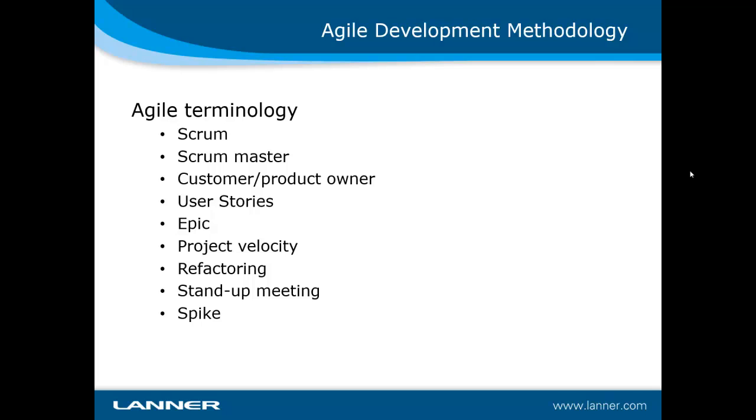Normally the requirements in Agile development are constructed in such a way that they're a sort of equal size of workload for each requirement. So each user story should be about the same size. If we get a story which is particularly big, which in fact could be broken down into a number of user stories, we call that an epic, in the same way as in literature an epic is a construction of many other stories.